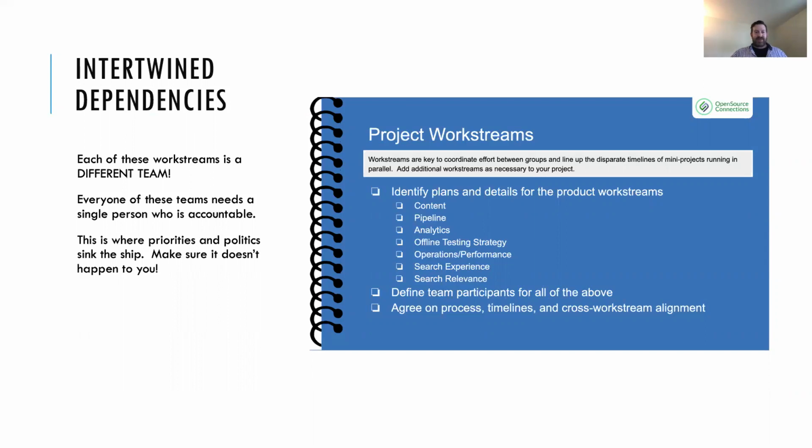We had some fun times, but pick what works for you and make sure that the teams that are focusing on these things are working together and talking together and they know, okay, well, I'm going to get this content set on this date. Oh, but you need to test the relevance by this date. So you have to align the two and make sure that we schedule and coordinate.